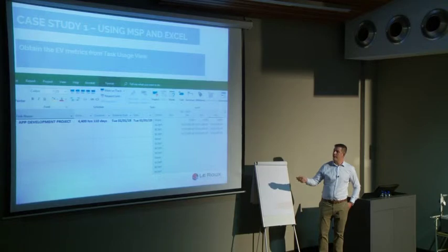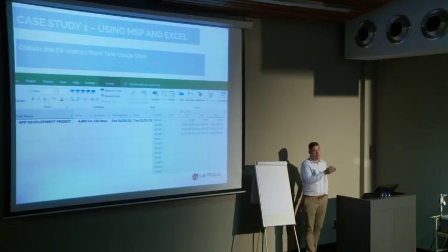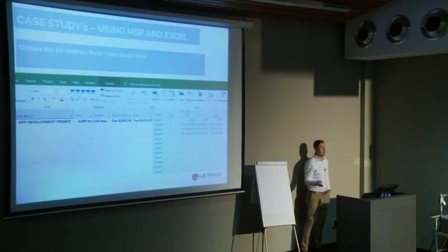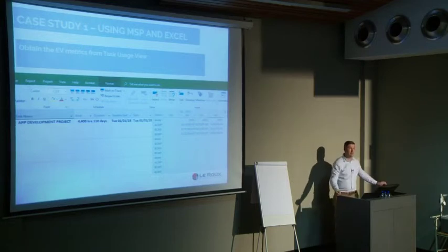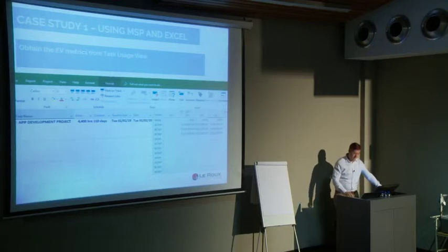So it shows me the actual value, planned value, earned value. So earned value now is based on the actual performance percentage complete against my activities. So it's very objective, if I've done my update correctly, obviously. Actual value also, because it measures my actual payments. And these guys have now worked longer hours than the effort that they actually got in terms of completion.